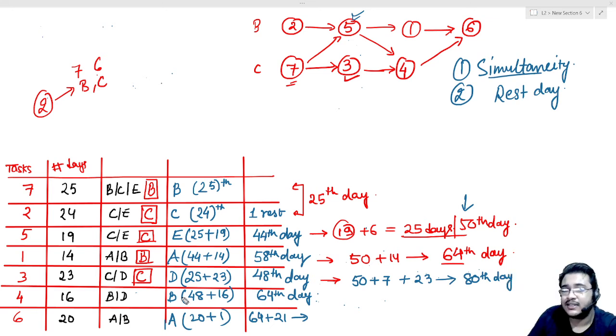Okay, this is an interestingly difficult set. That is why it still puzzles me so much. So between B, now I know you guys have been able to figure out, this position is for B, because C is not there. B will come for both the positions. But understand one thing, during these 23 days that C takes for the completion of task 3, B would have got his 7 days rest, which he perhaps was after the 58th day. B would have got his 7 days rest, so B will not take any rest at this position.